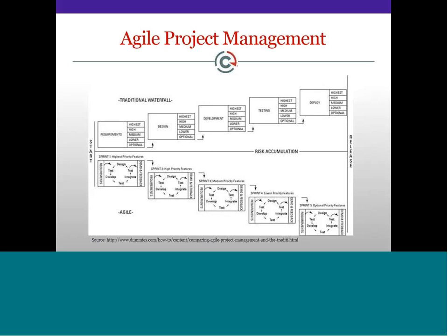We start a project, we build up a plan, we fix the requirements, then we fix the design, then you develop, then you do testing, and then you deploy. But the basic thing about this is that these things always change. No matter what you do, you cannot fix them. This model is made with the mindset that you fix things in time.